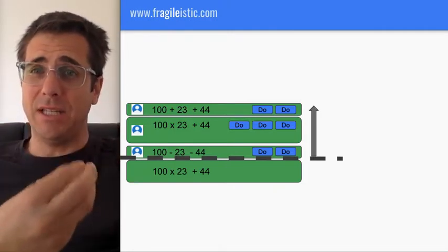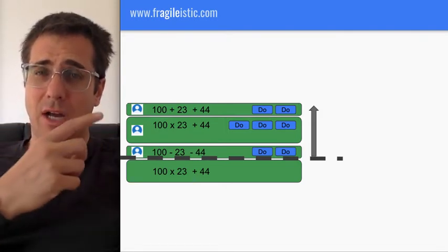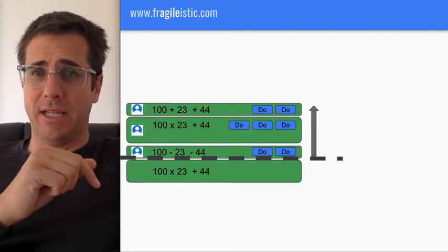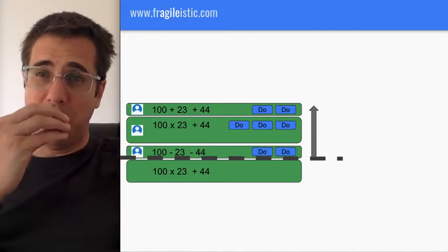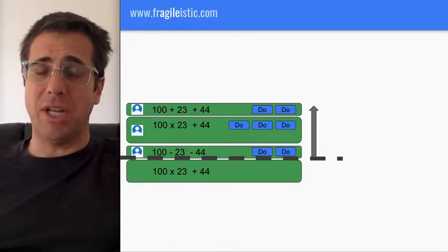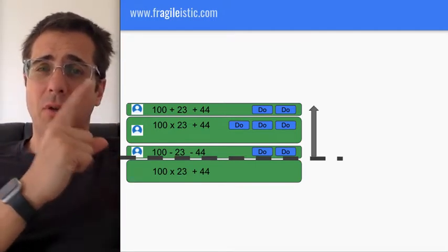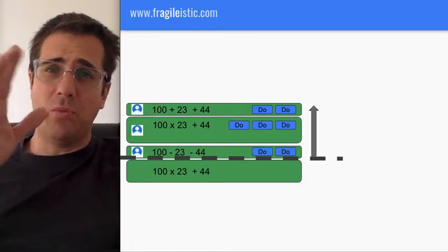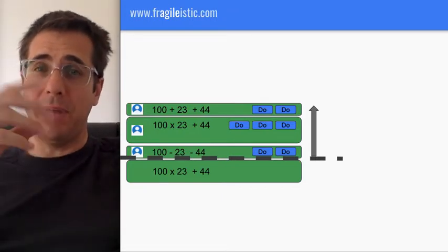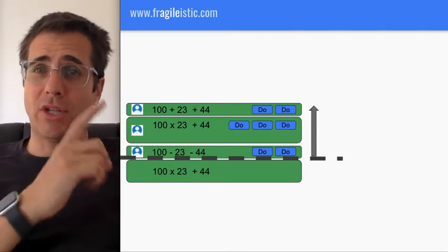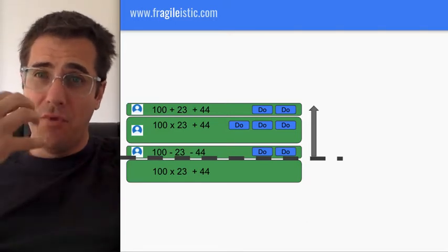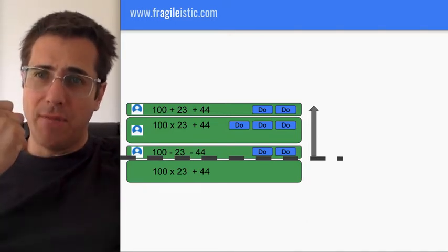The team meetings should be about talking to these cards, what's done and what needs to be done next. It should be really crisp. That's why it's called a stand-up. You can stand up and say, to get this one done, we need to get these 2 actions done. I'm picking up one, can someone pick up the second? That would be it. Then the next day, we finish those 2 actions, we're moving on to this card, and we're going to get this done. Really focus on delivery now.